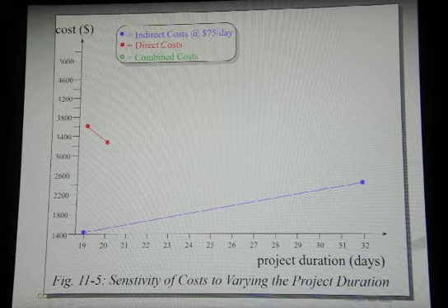Our direct costs, we are finding them out by the schedule that we have, by inputting our durations and our costs. And then the combined is by adding these two values together. So here we are adding 1,400 plus 3,700, and this is the total there, 5,000 and some change. If we add this number plus this number, we are at this green number over there.